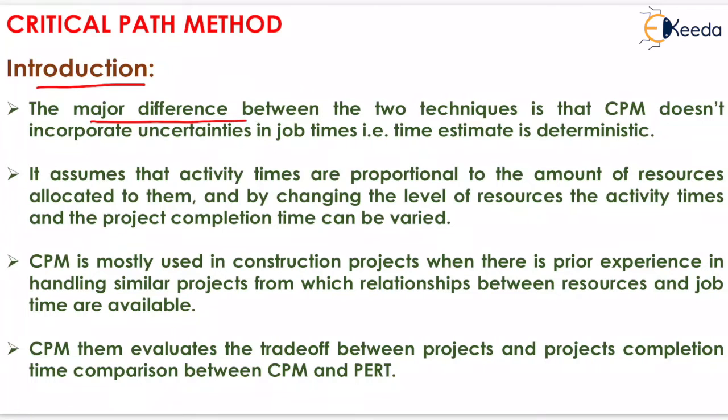The major difference between the two techniques is that CPM does not incorporate uncertainties in job times. That is, time estimate is deterministic. It means that CPM only deals with the deterministic approach, whereas PERT deals with the probabilistic approach.